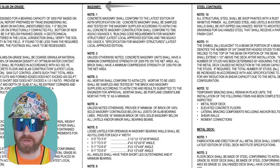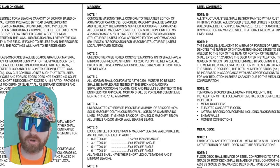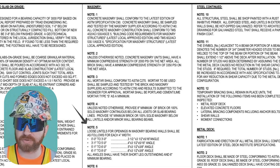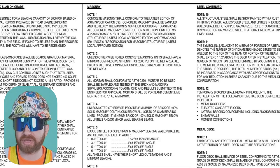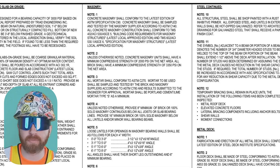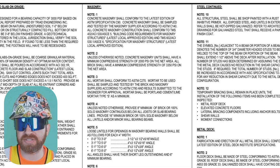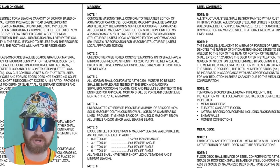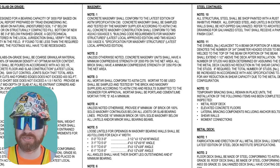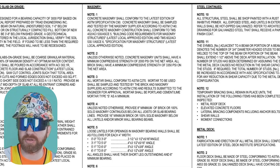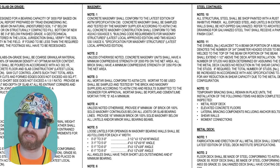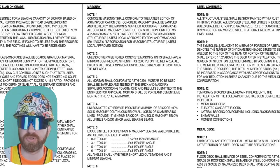Under the masonry section, these notes cover building codes to follow, the strength of the masonry, and the mortar to be used. There are also additional steel requirements referred to as loose lintels that go above openings to support them. Depending on contract structure, the mason will provide CMU brick, mortar, and masonry accessories, but typically not the steel angles — those come from your steel fabricator, though the mason installs them. If these steel angles need to be galvanized, that typically takes three to four weeks depending on galvanizer availability, and all of this needs to be baked into your project schedule.